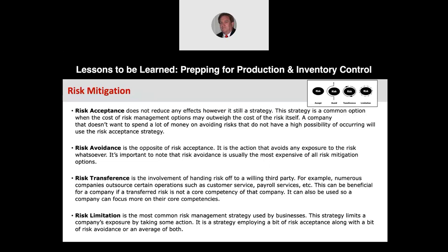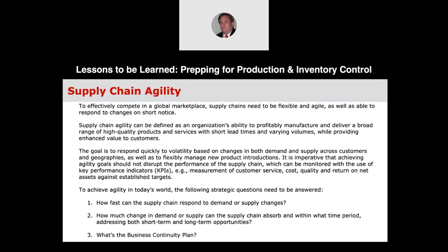That's where you put the risk mitigation in, and your lower RPNs you address when you have the resources, but you first attack the high RPN. So risk limitation is going after the high RPN and making sure that you have countermeasures for the high RPN.